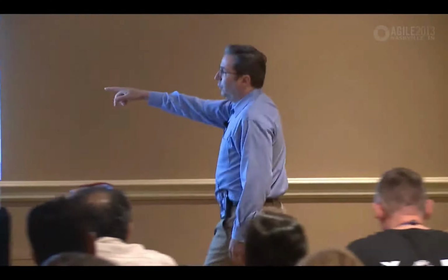Well, the only way you can do that is to do the math. First question, what does a 6-week delay cost in lifecycle profits? If I tell you right now, I'm just going to delay whatever you're working on right now by 6 weeks, you should be able to think about that and say, wow, what's the cost of that 6 weeks in terms of overall lifecycle profits?